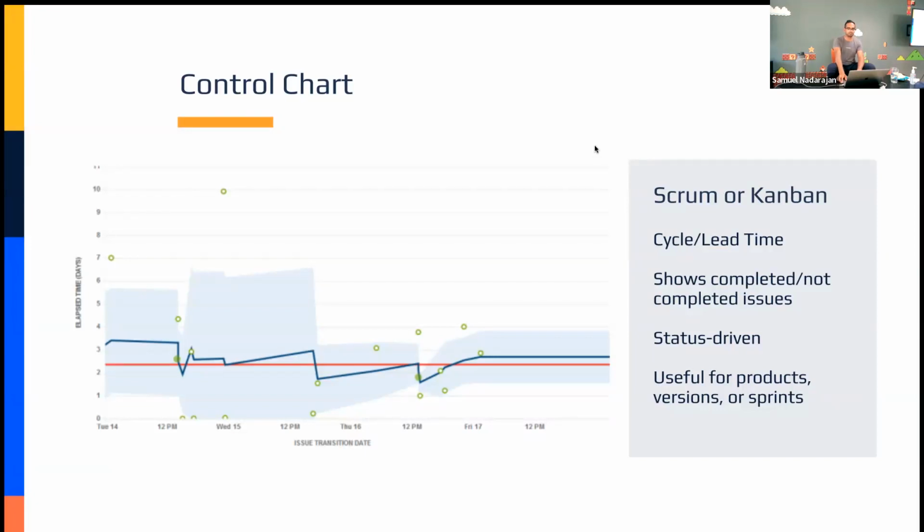So there's no strong opinion as far as whether this is only available for sprints, or only available for a specific version. At the end of the day, it will start by showing you all of the information that's included on your Kanban board. And then you can further whittle that down to just quick filters. So if I have 200 issues included in my Kanban board and I apply 2 or 3 quick filters, I could create a control chart that shows me what 50 of those 200 issues look like from a rolling average perspective. Okay, so you're just saying,